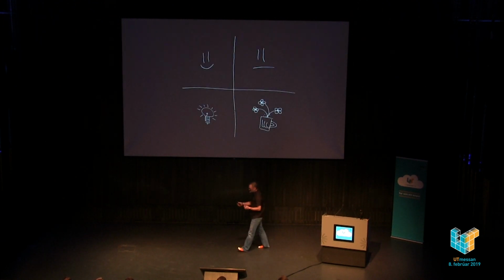And so what happens in a learning matrix is you would just write up four quadrants, and you would say, we got the good stuff, we got something bad, we got ideas, and we got compliments or beers or flowers or kudos, however you want to put it. And write down silently, each and every one in the team would just sit down and write silently, maybe we would put on music for two tunes. And then one by one we would stand up and describe our tickets.